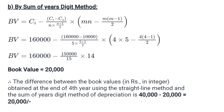Now let's calculate using the sum of years digit method. The formula for book value is: BV = CI − (CI − CS) × [m(2n − m + 1)] / [n(n + 1)], where CI is the initial cost, CS is the salvage value, n is the life period, and m is the year in question. Putting all the values in, we get the book value.